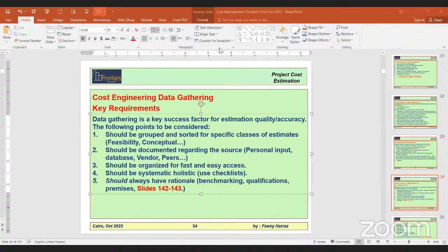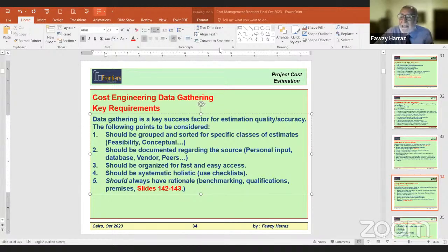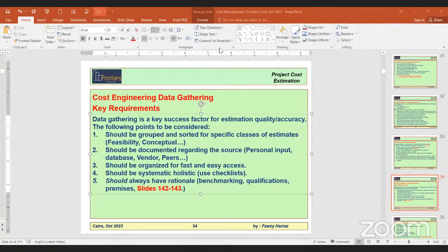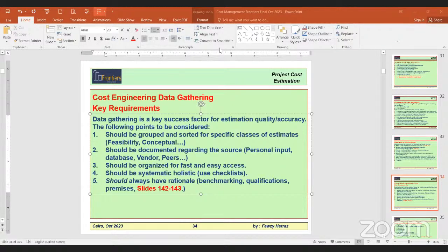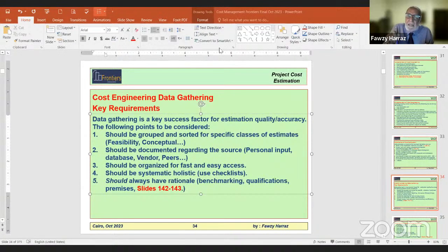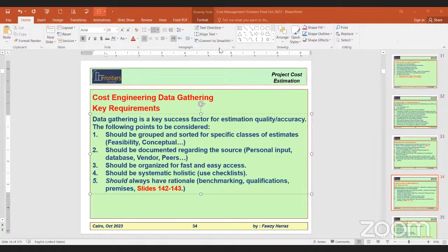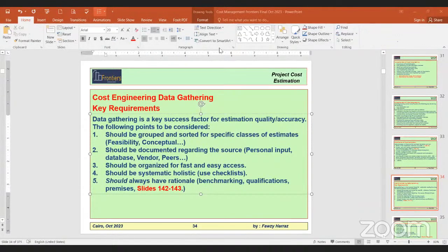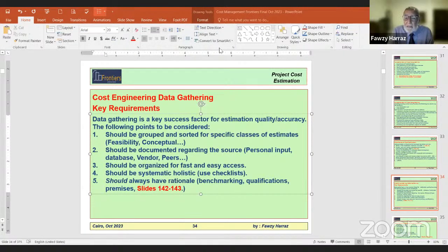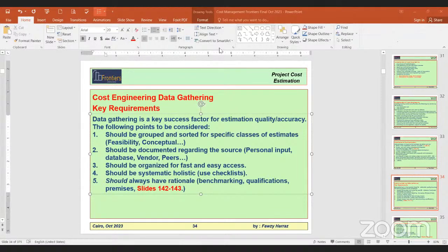In this case, the only approach is to cancel the bid. You know that these are not real market bids. They are cartelled, rigged bids. There is corruption in tendering, and this happens. And they know internally that the company is in a hurry to place the orders. So it will be a big challenge to spend 50% more on this project at these cartelled prices, or recommend a rebid. This is a management decision.